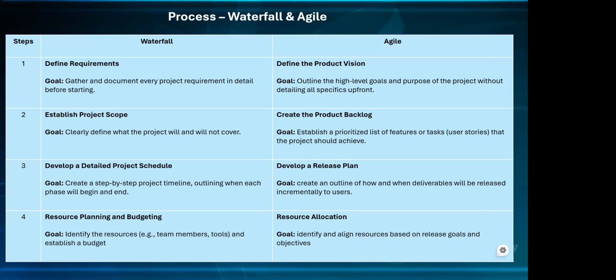After that step, the next step will be resource planning and budgeting, because you need to know all that scheduling. Once you know the scheduling and the timeline, the milestones, those 4 weeks or 3 weeks or thereabout, that's when you're able to plan your resources. Then you will know that the developer, we need them for 6 weeks. So when you're sourcing for that human resource, that labor, you're looking for a developer that is going to do 6 weeks. Another thing that happens during this stage is you have a meeting with that developer: this is what we want to develop, this is what we want to do.